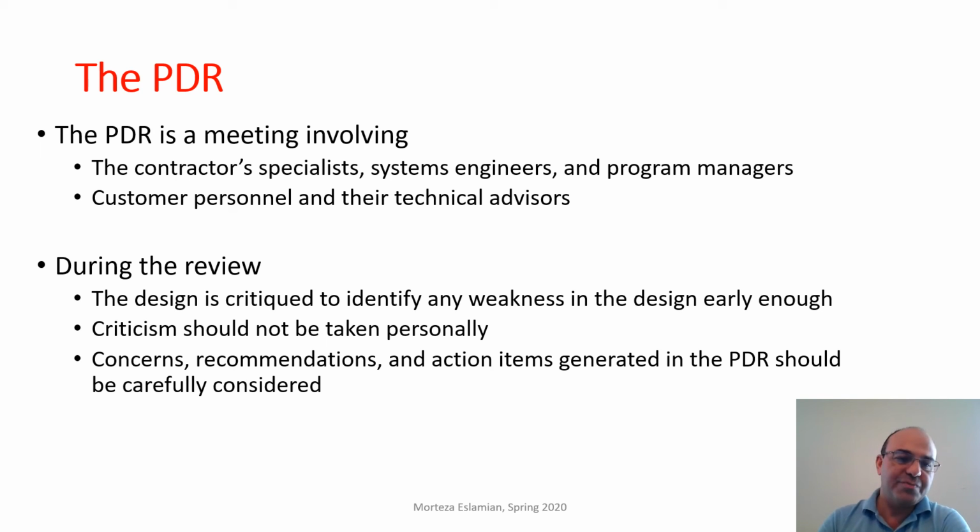During the review, the design is critiqued to identify any weakness in the design early enough, and criticism should not be taken personally. Criticism is actually not about people or engineers, it's about the design, and the objective is to make sure that it will work properly. Concerns, recommendations, and action items generated in the PDR should be carefully considered and addressed so that in the future problems will be prevented from happening.